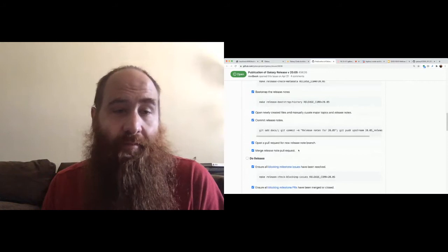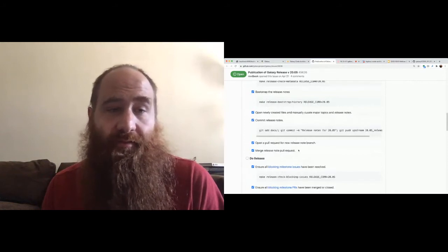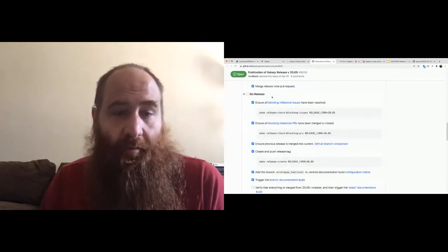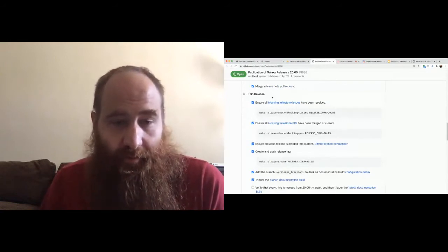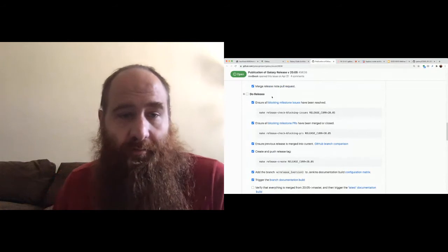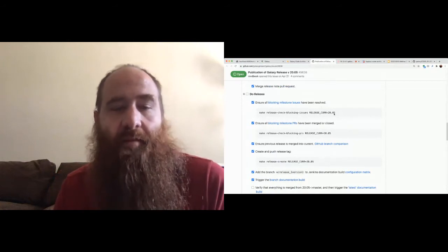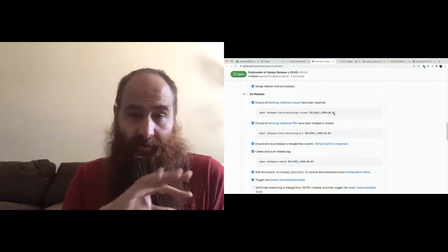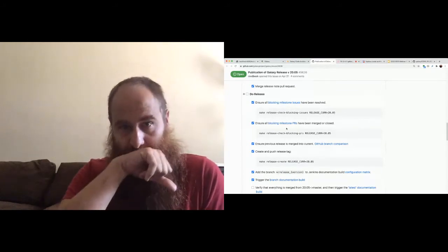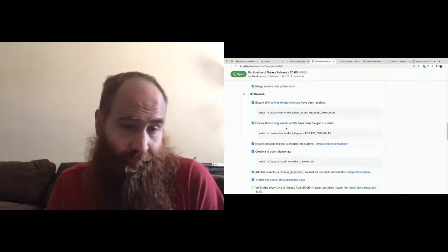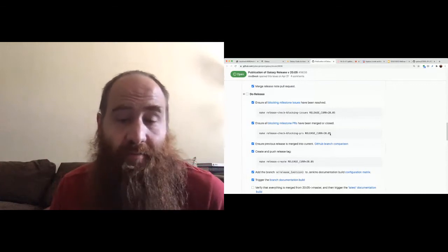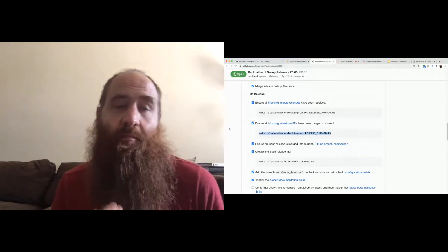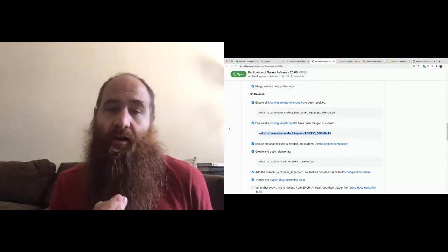And then when it comes time to do the release, again, May's release, I think, was toward the end of June. We're busy. But there's another set of processes. Again, make sure there are no blocking issues this time and no blocking PRs, so nothing targeting the 20.05 branch. When I'm the release manager, that's my sign that it's time to do the release: when there hasn't been a new bug fix PR for a while.